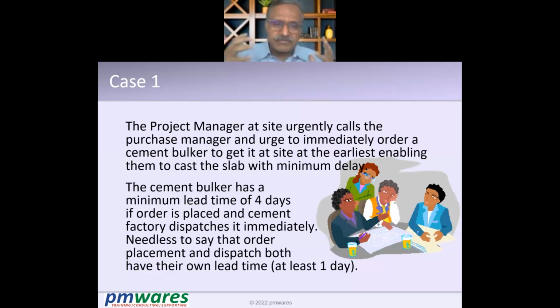or the kind of bulker you need is not available and it becomes available after 1 or 2 days, as the circumstances may be, you can add those days too. So maybe 6 to 7 or 8 days is what you can consider as delay to the whole work. The more times it happens, the more the delay. If it happens on the project 4 times, your project gets delayed by 1 month.